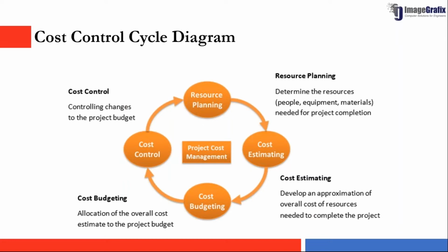Once we have our estimates, then we might be keeping some contingencies for these costs. As a general contractor submitting a quote to an owner, you will also be adding your project cost and profit margins. Then, once we have our budget, comes the cost control.